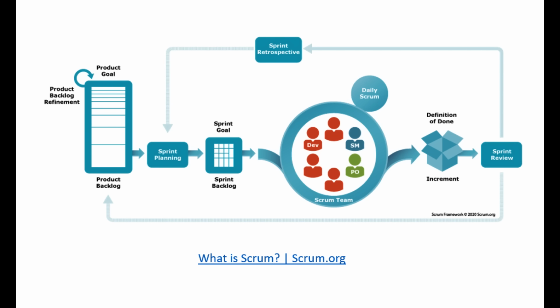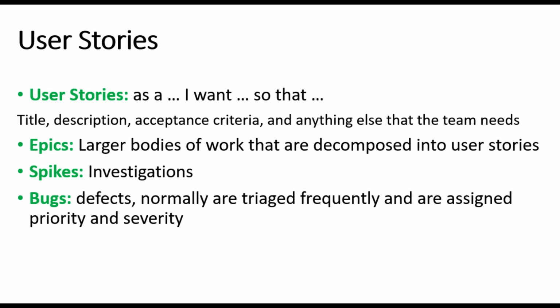As mentioned, in Scrum, work is divided into work units called user stories. What the product user wants and why the user wants it is captured in the user stories. Therefore, the user stories ideally follow this format. As a user, I want X so that Y. Or as a user type, I want X so that Y. For example, assume that your product is an app that includes different cooking recipes. Then as an international food enthusiast, I want to see recipe categories by country so that I can track meals that I cook by country.